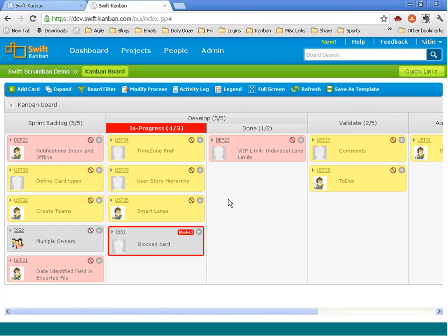Okay, that's fair enough. The second question is a simple question. In the Kanban board, is it a push mechanism or a pull mechanism? Meaning, if the developer has completed the task, would he be pushing it to the next stage of testing, or is the tester expected to pull it up? The recommended way is definitely to pull it. It also depends upon the level of maturity in the team, but the ideal is the pull, because that is where Kanban is really helpful. Once you have a pull mechanism, you're no longer depending upon other team members, or your lead or your product owner, to assign you something. If you are comfortable, you can pull the card and start working on it.